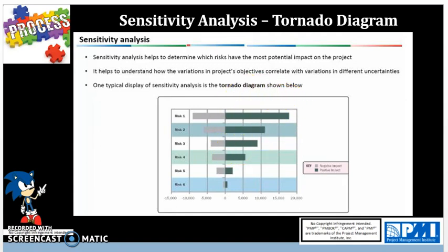And essentially, if there is a high risk or high threat item, we will prioritize that as an action item and have an aggressive response. If it's a low risk or low threat item, we put it on a watch list and add a contingency reserve and have an active acceptance of this risk and monitor it.